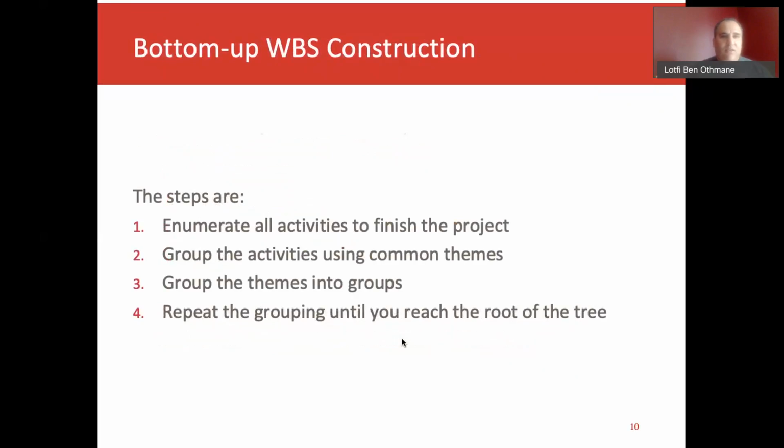So in the bottom-up work breakdown structure, the steps are: enumerate all the activities to finish the project, group the activities using common themes, and group the themes into groups. Repeat the grouping until you reach the root of the tree.